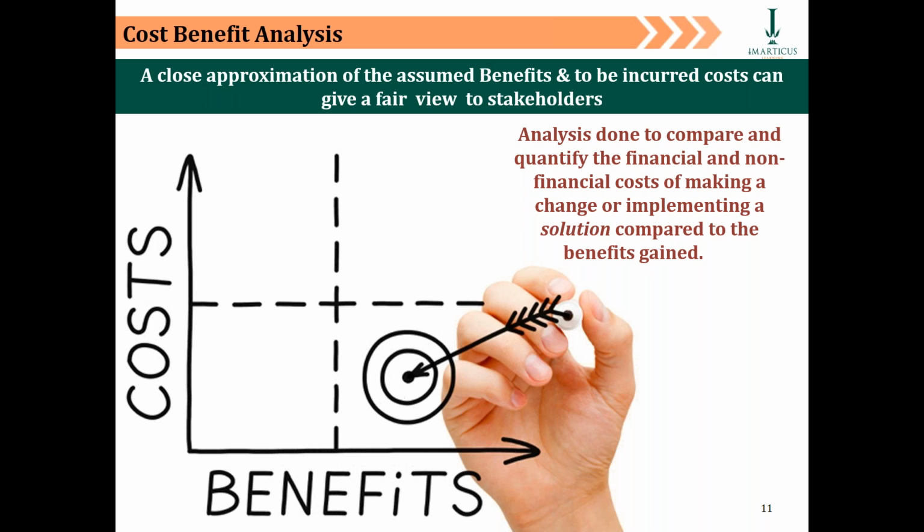Now it's only after 5 years that you've broken even, because your total spend on the project was $1 million, and then you gained the same amount of money back from the market as profits over the next 5 years. So broadly, I will say 5 years is your break-even period. After that, whatever money you incur in profits is your incremental margin, because that's going beyond the break-even. So typically, for the kind of initiative you have taken today to invest money to, let's say, automate your supply chain management, the break-even period is 5 years.